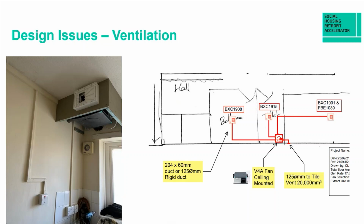You also have to consider the potential of present ACMs. So where we've got surface mount, whether you're doing boxing in, whatever it may be that is going to be intrusive, and then you're going to start drilling towards the ceilings, that is a big pinch point. So please make sure that you check that out prior to any installation rolling out on your MEV systems.